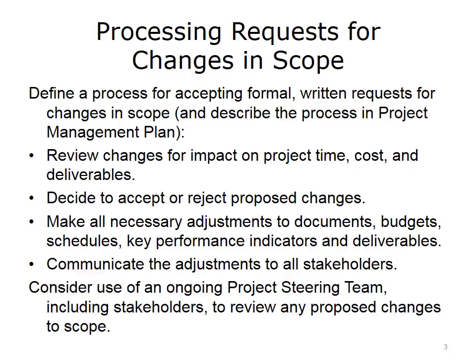Consider this classic example of how a simple one-sentence change can have tremendous implications. Suppose a change request stated, "Any user could negate any change he or she had made during any interactive session." This simple one-sentence change might sound harmless, but there are tremendous implications for any system to accept the ability for users to undo any previous actions. This is often extremely difficult to implement.